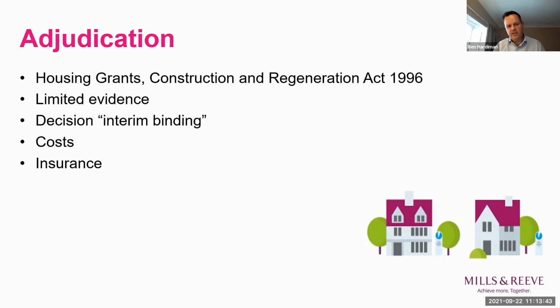Yeah, as I said, a dispute can be commenced at any time. So bearing in mind the tight timetable, which I'll talk to you about now, a referring party will usually do all that it can to ensure that its case is in order before it takes steps to commence the process. But what they have to do is serve a notice of adjudication, and they apply to a nominating body to appoint the adjudicator, and that appointment must occur within 7 days. The referring party then serves a referral notice, which is the equivalent of particulars of claim, within 7 days.